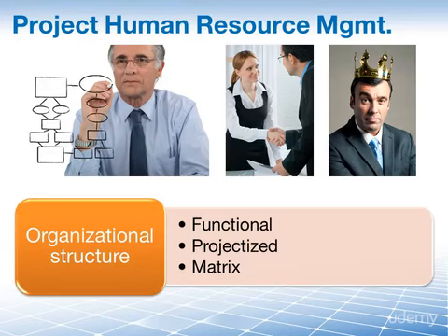Just imagine, if you are working in a weak matrix organization, that means that you, as a project manager, really don't have much say over your project. You're more of a project coordinator, or you may serve more as a project expediter. Therefore, it's not just you who's going to hire and bring on these resources to the project. That is most likely the functional manager's job to do.